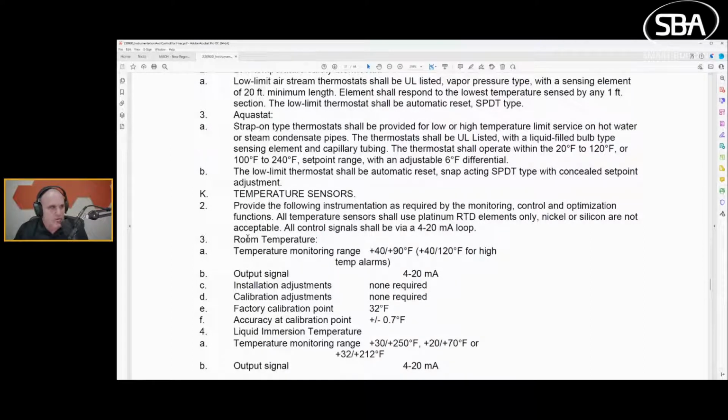For some of you OEMs, you're going to have all this built into an estimating tool already. For some of you on the SI side, system integrator side, you'll also have this built into an estimating tool. Others of you will just have a spreadsheet. And the workflow remains the same. Go to wherever your material listing is, search for the material that meets your needs based on the spec, and figure that sensor out.